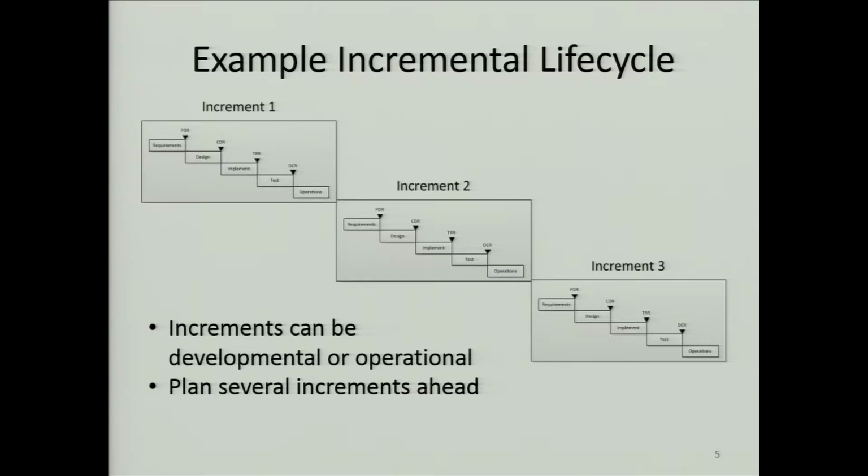Large systems, the biggest example that I've worked on is the space shuttle, use an incremental life cycle, which is a sequence of increments where each of the increments is a waterfall life cycle in itself. Typically for large projects, each of these increments might be 1 year long, give or take a few months. So they're a long time.